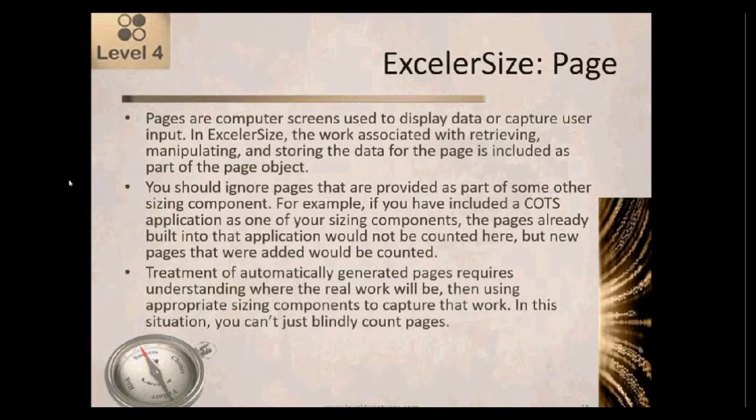However, we don't want to say we've got 1,000 pages, because it's the code that's generating those pages. It's not a human person. And so there's really no work associated with those 1,000 generated pages. Instead, we want to look at how complicated it is to write the program that turns the operator input into the generated PHP code. So what we may have in that situation is one page for the input data plus one batch program for the PHP generator.